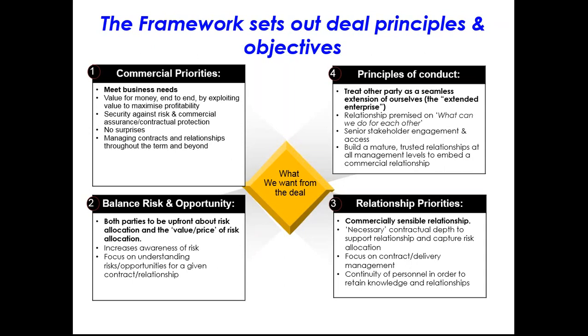At what point would the goods being supplied by a supplier cease to be at the supplier's risk and be at our risk? In other words, if they're on a lorry being shipped from Abu Dhabi to Dubai and the lorry has an accident, whose problem is this? Is this our problem as the customer, or is this the supplier's problem? Incoterms define the point at which the risk passes from the supplier to the customer. That might be ex works. In other words, the minute these goods leave the supplier's factory, it's at our risk. Or it might be the risk is on a delivered basis. The risk only becomes ours when the goods are delivered.